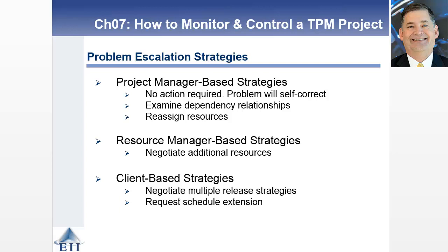We did a 2-week intensive intervention, with probably about 25 people working on the project, 5 coming from the consultant firm and 20 coming from inside my organization itself. We made significant progress, but we really didn't get to the point. So we entered into a second round of negotiations, and then they brought in a second team that had not worked on the project before, and they're now working on the project for 6 weeks. Both of the interventions were done at no cost, and so you can see all 3 of these strategies beginning to fire, and I'll talk a little bit about that.